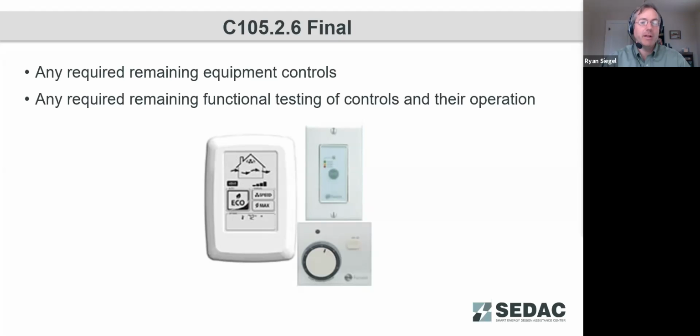So identifying that and saying, okay, you may continue with construction, but you need to get the heat traps installed. Here again at final, we go back and catch any of those items that would have gone on that punch list, and check to verify that those have been taken care of before issuing the certificate of occupancy.